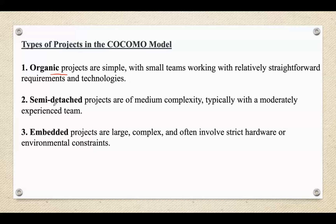The second type is semi-detached projects. These have a moderate level of complexity and involve a mix of experienced and less experienced personnel. The project might involve more than one team working in parallel with coordination required between them. The software can have more complex requirements than organic projects, but they are still mostly well understood. Some uncertainties or changes may occur, but overall the development process is structured and controlled. Examples include medium-sized business systems, moderate-scale enterprise applications, or internal corporate tools.